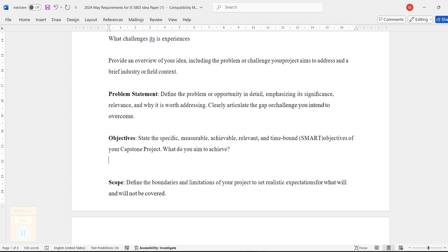So in this case, in the next 30 days, the longer queues in front of the hospital should be reduced by 20%. Now, in this, longer queues is very specific, and it should be completed in 30 days. It is specific, 30 days is measurable and time bounded. And how much are we decreasing? 20%, maybe 10%, maybe 90%. These are all achievable, relevant, time bounded, specific, and measurable.